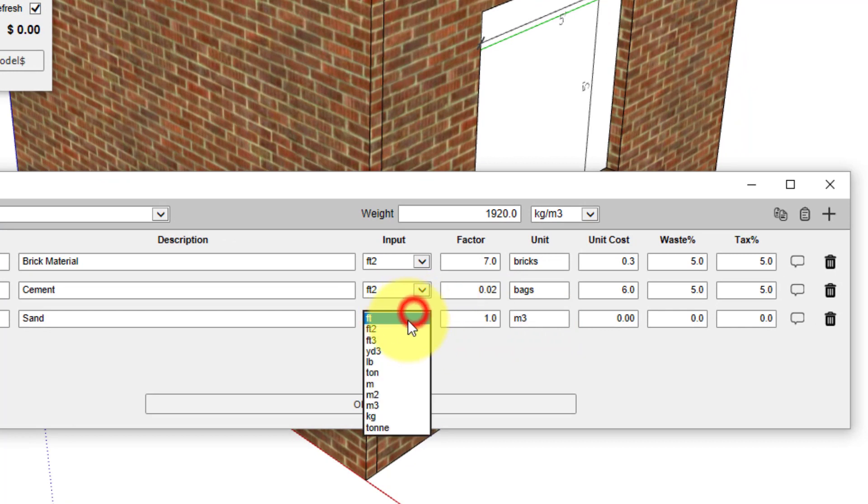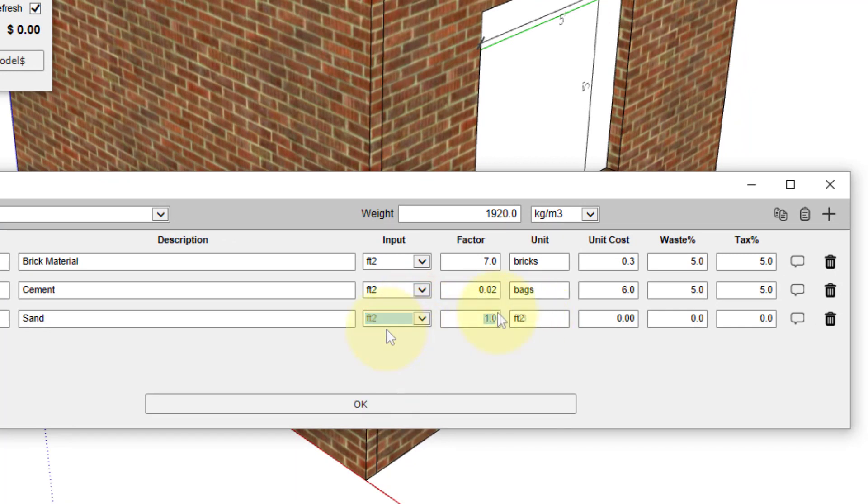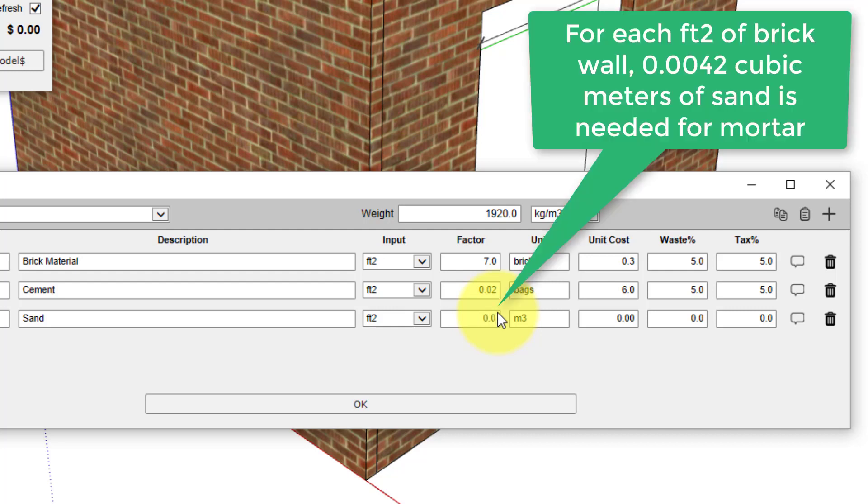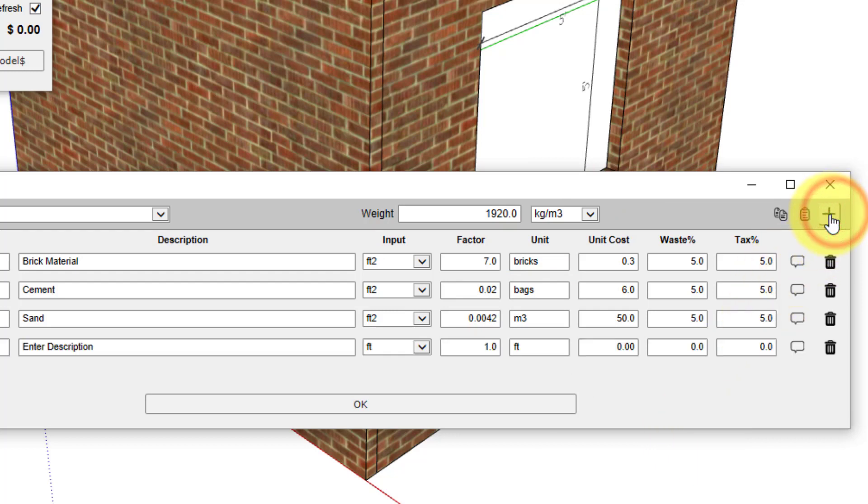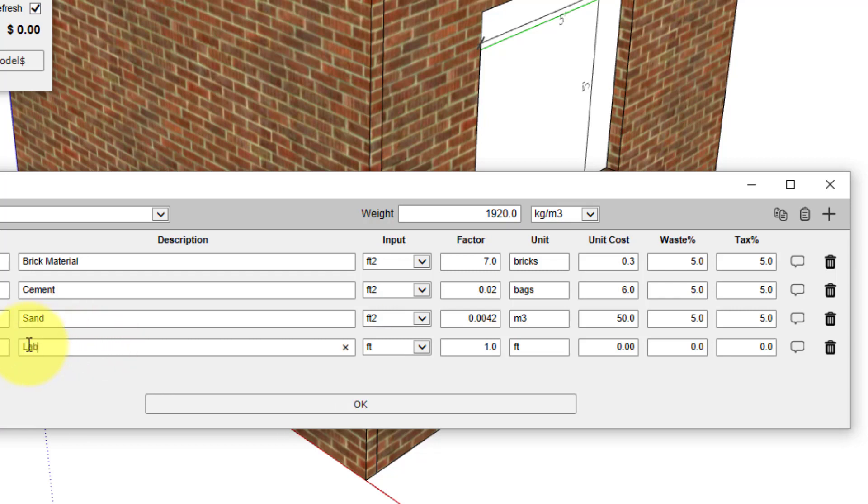The input again will be square feet, so that conversion factor to convert from square feet of brick wall to cubic meters of sand is 0.0042. The cost per cubic meter of sand that we'll use is fifty dollars. We'll apply our waste and tax one more time, and lastly, we will have a line for labor.